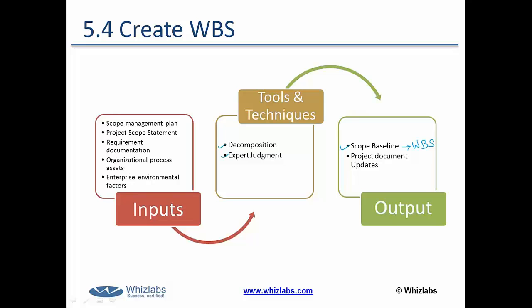The primary input you need is the scope management plan and the detailed project scope statement created in the previous process. Along with that, you also need the requirement documentation, which was the output of the collect requirements process. Additionally, two common factors apply: organizational process assets and enterprise environmental factors. This is one of the most important topics of scope management as well as PMBOK 5.0.